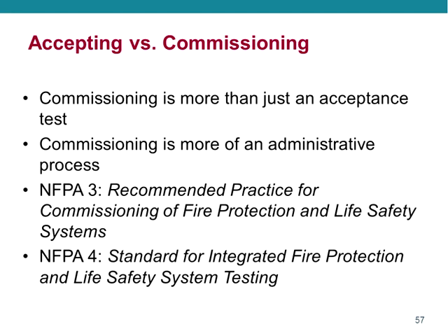Whereas acceptance testing is a very narrow sliver of commissioning done at the end of the installation period, at the acceptance period. So there's a big difference between commissioning and acceptance. And I know a lot of you probably, like I sometimes do, call commissioning and acceptance the same thing, and they're not. Commissioning is a far more involved administrative process.